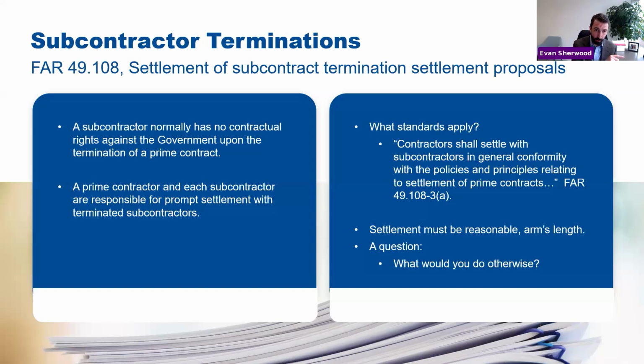You don't want to have paid out to your subcontractor and then find the government later saying, no, you can't do that, or we don't think those costs are reasonable. This happens from time to time. It can be an enormous headache. It can drive disputes. Sequencing this and having everybody thoughtfully on the same page about where we're headed is extremely important to avoid disputes.